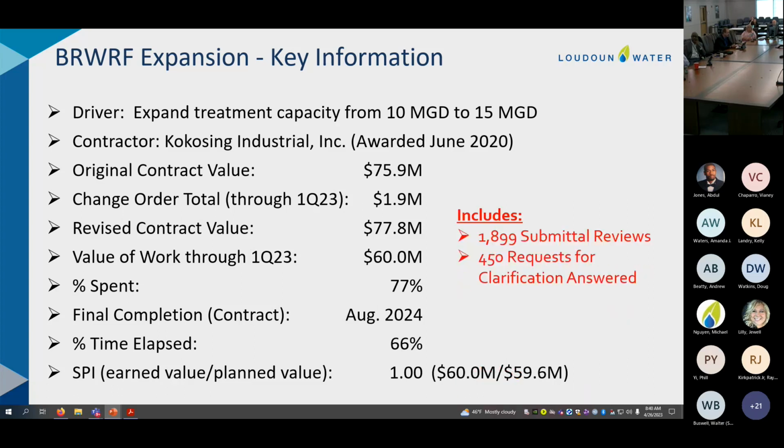All right. And then I also don't want to forget that along with the contractor working hard, our engineering firm, Hazen, is working hard as well, providing CA services. And so just a couple of quick stats on that. We've seen Hazen review about 1,900 submittals so far on the project. And then they've also answered 450 requests for clarification among all the other support services that they do. But in terms of quantities, those stand out the most so far. So Hazen's providing good service to us as well as alongside the contractor who's continuing to construct the project.